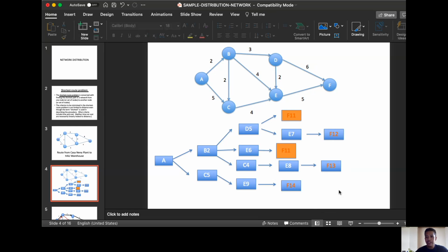After exploring all possible routes, we can now choose which has the smallest value at node F. So look at all F boxes. Here we can say that we have two possible routes. What we're going to do is backtrack. From F, it came from D, and then from B, and then A. And then let's take another look at this one.